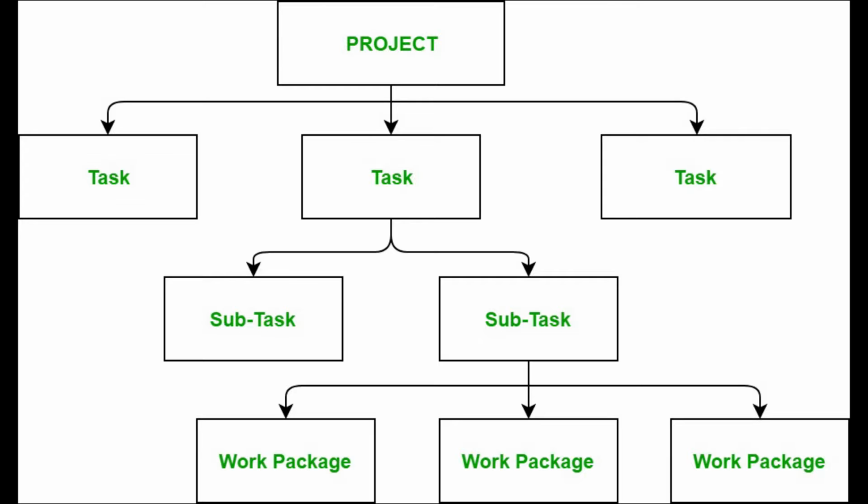A work breakdown structure is not a document that shows the whole list of activities performed in a project. Rather, it is a document referring to the deliverables that are the result of the activities of a project, and not to the activity itself. In simple words, WBS is deliverable oriented, not activity oriented.